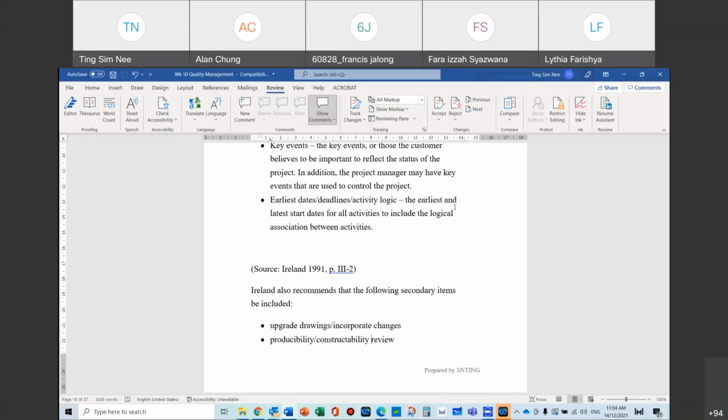If this process B is where you check, then you will check it. And then how you check it, what rubrics you use, what form you use, what sort of quality control, what sort of monitoring tools do you use here? And then if it fails, what do you do next? Do you rectify? Do you repair? So you have every stage. You catch it at every stage.